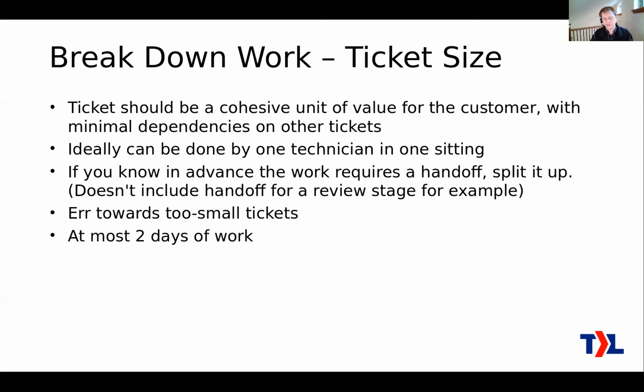Anything more than 2 days, there's not enough visibility into that. You ought to be able to break that sort of ticket up into other tickets that are at the most 2 days of work. The only exception is stuff that's really experimental, where you don't even know if you're going to be able to do it successfully, and the customer understands that, and they've got a big budget because they want something nobody's ever done before. You can't say how long it's going to take. If that's the case, then maybe go ahead and make it more than 2 days. Otherwise, 2 days.